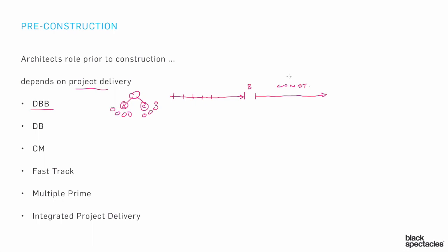The architect's role in design-bid-build is very different from design-build. In design-build, there are only two entities: the owner and the GC. That single relationship means there's only one phone call if anything goes wrong, which is great. But it also means you lose the checks and balances — the architect looking out for the owner, the contractor keeping the architect's work cost-reasonable, and both making sure the owner is paying their bills.